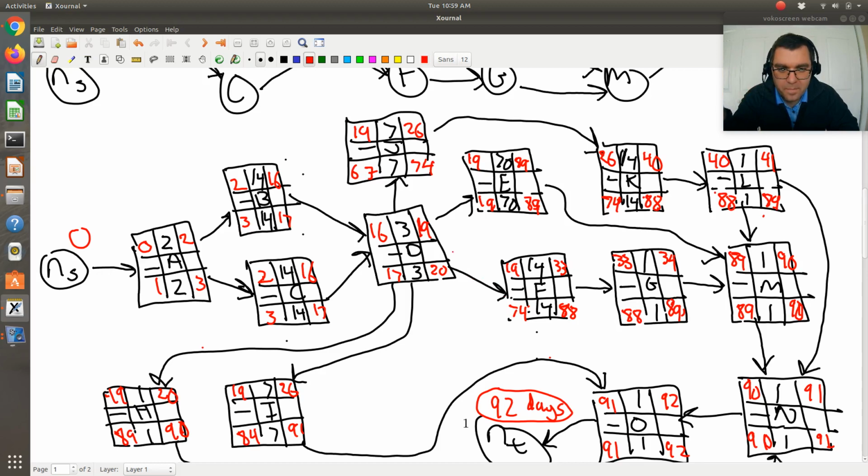And so then D, looking at the minimum, so there's going to be E, right? So now, because everything is off by 1, 19 and 16. So these are all going to be 16, 16, and 2. Okay. And then this would be 2 and 0. All right, so my check was this should have the latest possible starting time of 0, since it's the only node connected to that source. All right, so it wasn't so bad going through the second time.